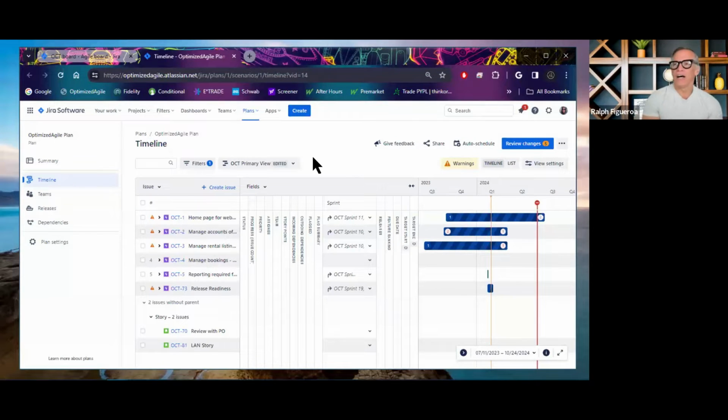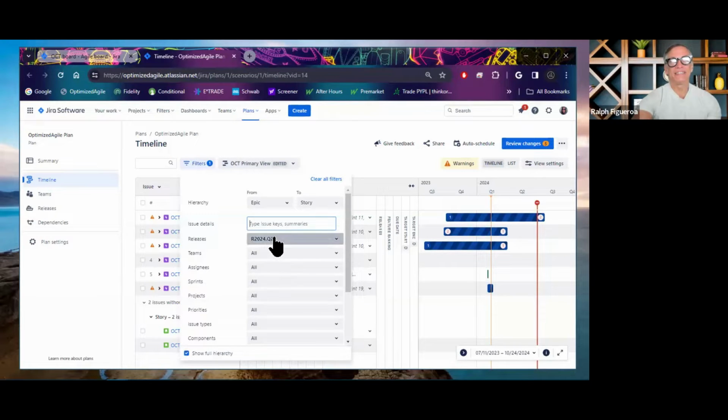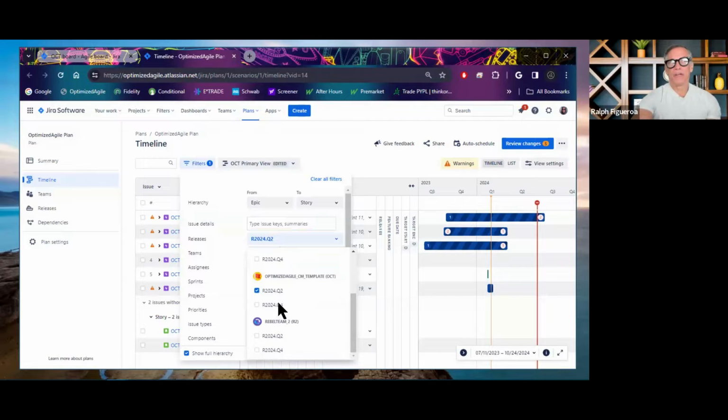Well, the suggestions that I would show about the now, next, and later, the best way to accomplish that, as I work with organizations, is leveraging the fixed version field with that level of discipline where you can track or tag the now, the work that you're doing for the team and for the current release. Let's say next is my queue for release, for example, in this case scenario.